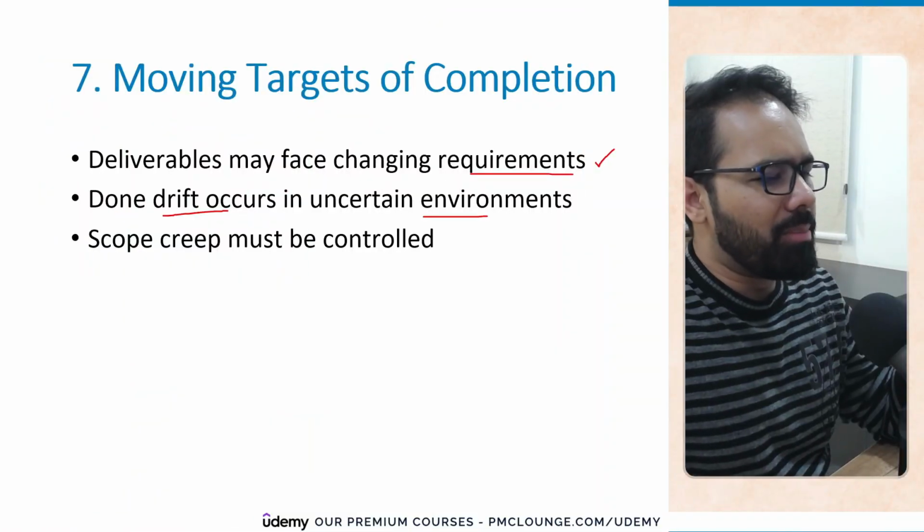But the fact of the matter is, even in agile, if you receive a new requirement or a change in the requirement, you put it in the product backlog. And then your backlog is strategized over, thought over, and refined. So it means that this change wasn't just accepted by the team as is. Your backlog was refined, it was given the weight, it was given the priority, and based on that, the change gets executed. So there is change management required even in an agile environment as well.